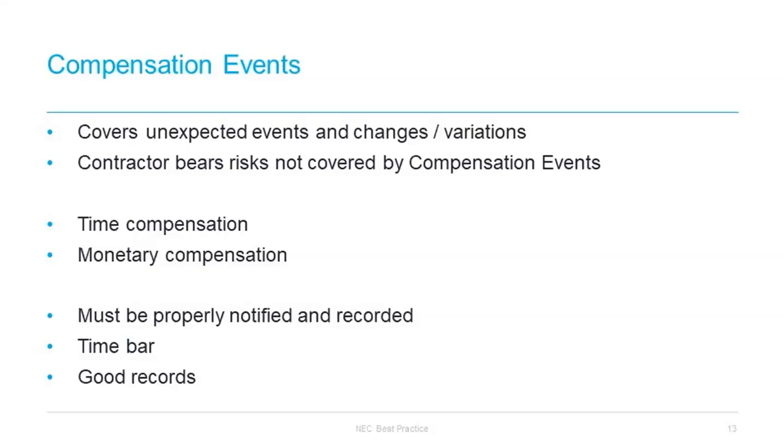It can be seen from this discussion in this section that it is vital that the contractor completes the relevant sections of its contract data at tender stage. Defined cost is used to value compensation events, and the shorter schedule of cost components defines what categories of cost can or cannot be claimed.